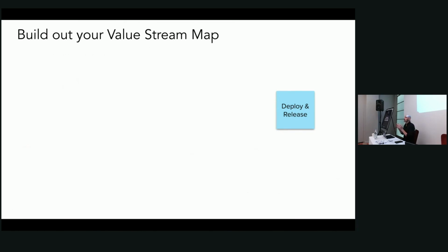I would say the Goldilocks zone is like 90 minutes, but usually that's only in an organization where they've done something like this before. Your first time, you're probably hitting 2 hours easily, but we don't want to spend more than 2 hours on this because people are sharp at 2 hours. They get really low energy and you start to really compromise after that point. So we want this to be really sharp, minimal, simple.